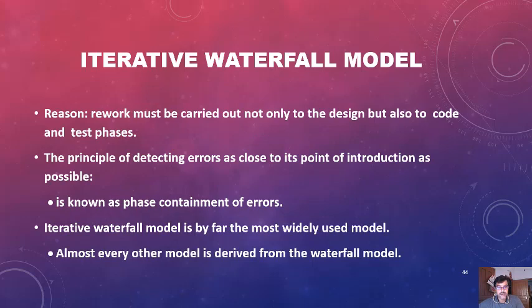The rework must be carried out not only to the design but also to the code and test phases if you find the problem or error in the system design or integration phase. The principle of detecting errors as close to their point of introduction as possible is known as phase containment of errors.